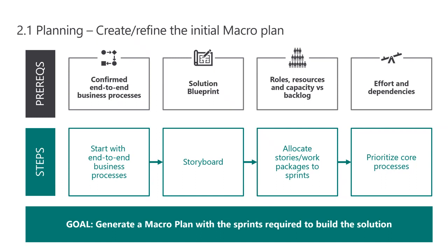And then you take that storyboard and you chop it up into work packages. These work packages essentially say, I'm going to be delivering these processes or sub-processes first, then these, and within these sub-processes, it includes some work from maybe 2 or 3 work streams. It could include work from a supply chain management work stream, a little bit of work from the finance work stream, a little bit of work from the operations work stream, right? So these work packages are combined delivery of something meaningful from a process or sub-process perspective.